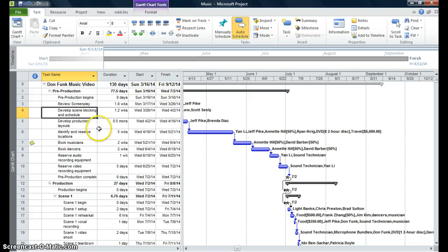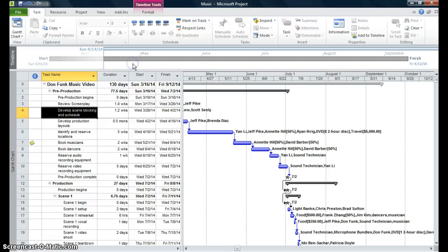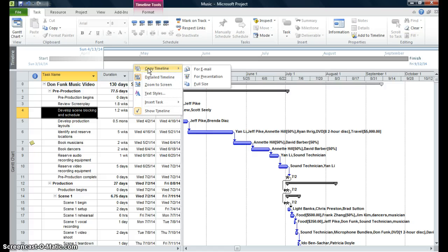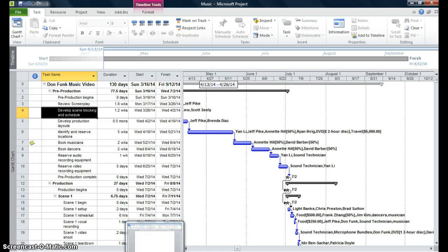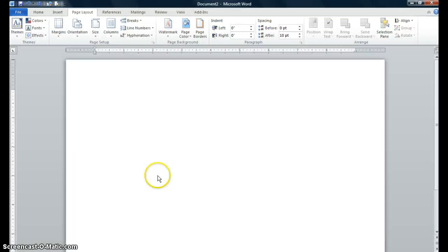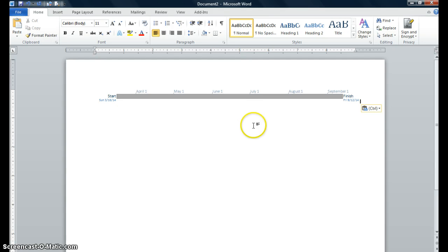So now, the stakeholders want to have a copy, a high level copy of the timeline. So what I can do is give them a copy of my timeline just by activating the timeline. I'm right-clicking on the timeline. Then I'm copying the timeline command to for presentation. I'm clicking on that. Then I'm going to open Word. Once I open Word, I'm going to my home tab and I'm clicking paste. And you see my timeline is now in Word.